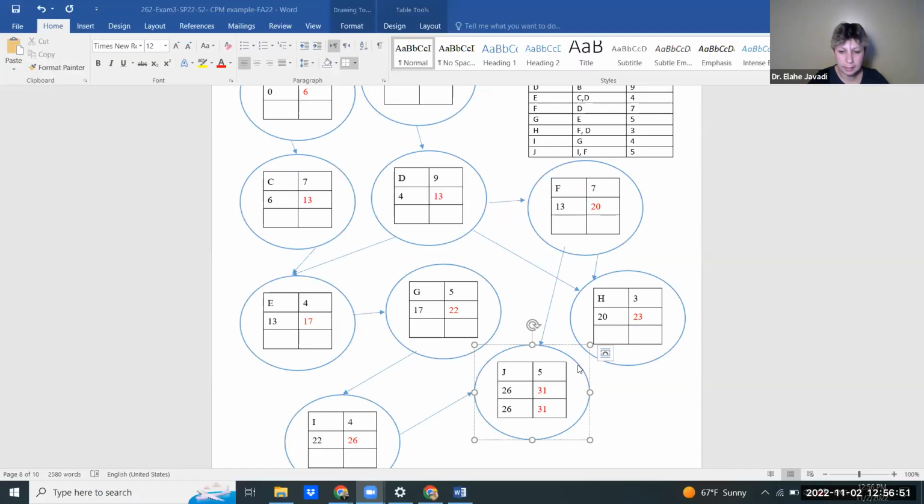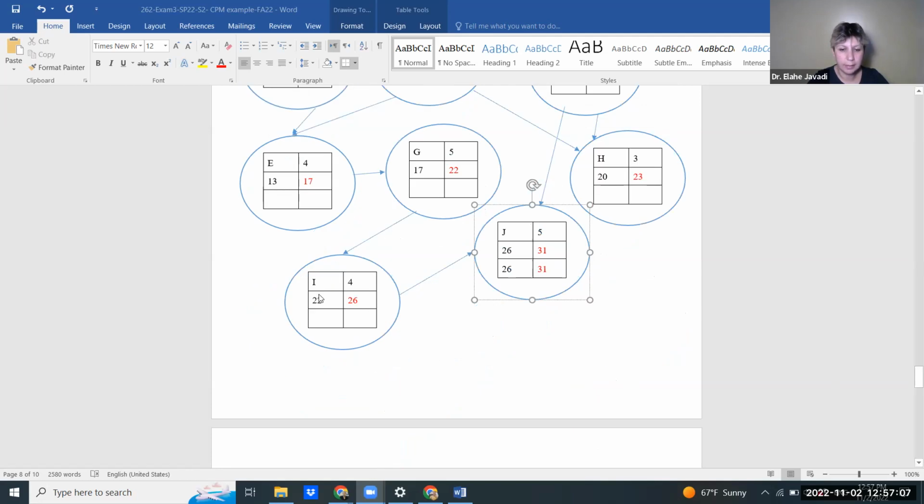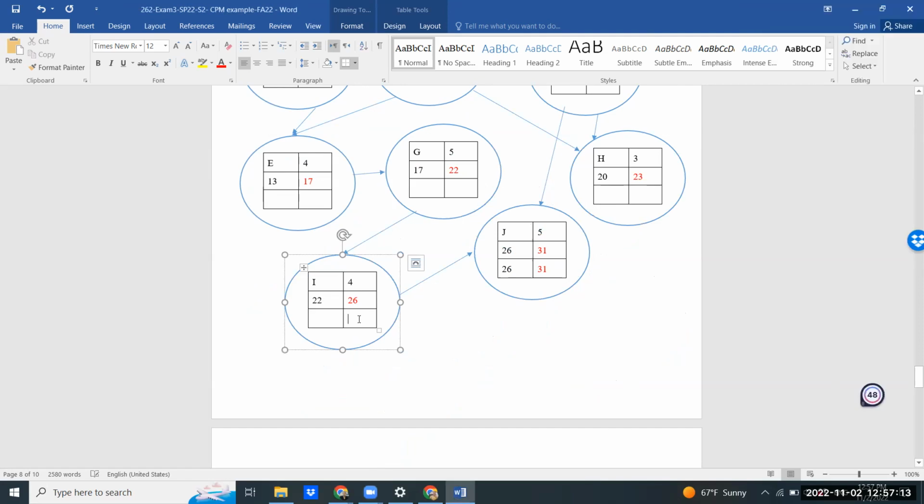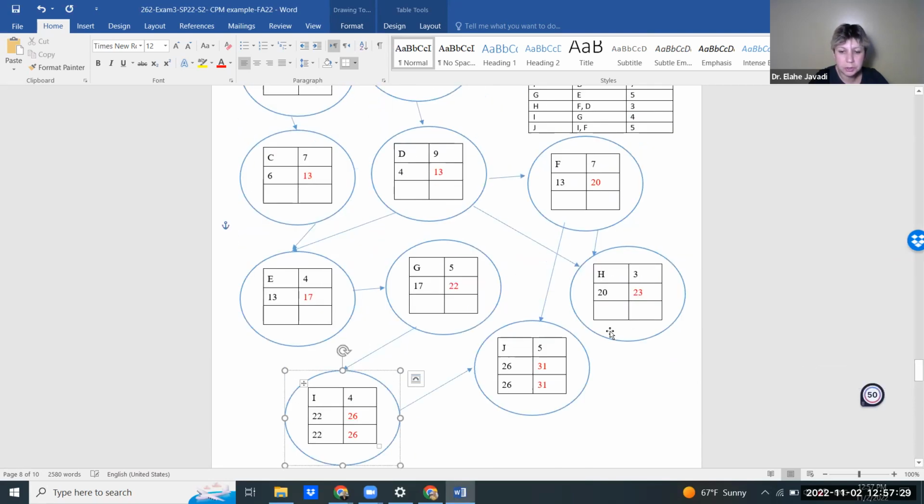All right, class, I need your names again appearing at the top. All right, who was it? Keegan was the last one. Carissa, give me I. We're going backwards. Give me I. Late finish. 26. Yes, because only J comes after it. You get the late start of that one and that's the late finish of this one. Late start minus duration. Good job, Carissa. Tyler, I, it's H. Now H.